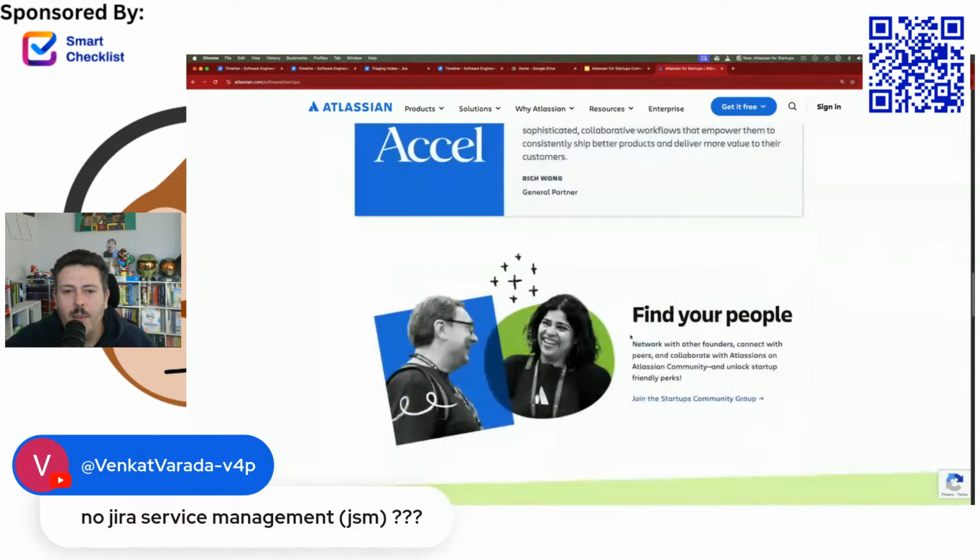We have date fields, which are way easier to use inside of Jira Product Discovery because you don't always need to know a date. You can go for a month, right? This is kind of cool. So you can just say, hey, we want to do this, but it's like a November thing, or maybe it's going to be an August 2026 thing, or maybe it's a quarter thing, right? Maybe we're shooting for Q4 of 2026, right? You don't get this kind of information inside of Jira and Jira Service Management, but you do get to see it here. So you can start shooting targets, right? You can start saying, okay, we're not quite sure yet, but we know we're targeting for the Q4, we're targeting it for Q3, right? And so you get this kind of data inside of Jira Product Discovery, which I think is really cool.